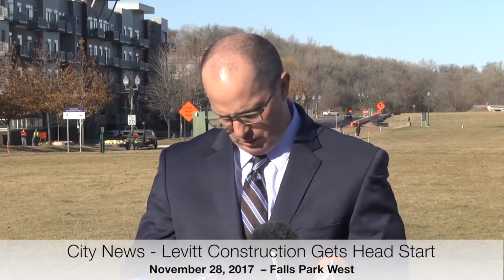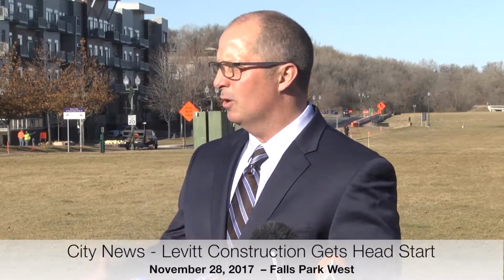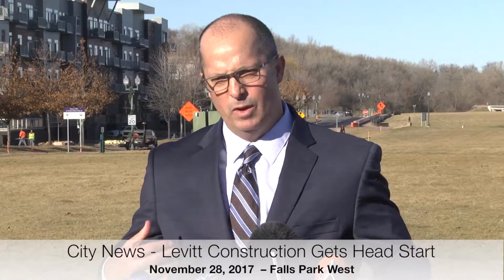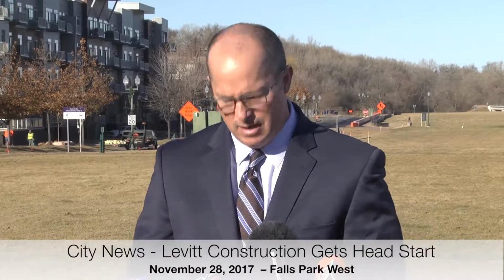And so to be able to get started really is great for us. One of the other nice things about being able to get the dirt placed this winter yet is that it allows that dirt to settle. It goes through those freeze-thaw cycles, and we have less concern about compaction as a result of that. So we'll have a couple winters where that'll take place.